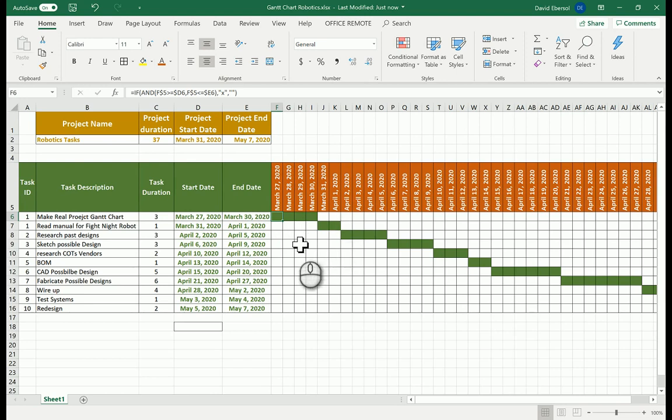Now I'm gonna teach you guys how to do this by comparing how long it actually took you, which is something you will have to understand after the fact, after you've completed it, to how long you think it took you. So this Gantt chart that you just turned in is going to be our baseline, and then you're going to revise it, and then this is what's due today.